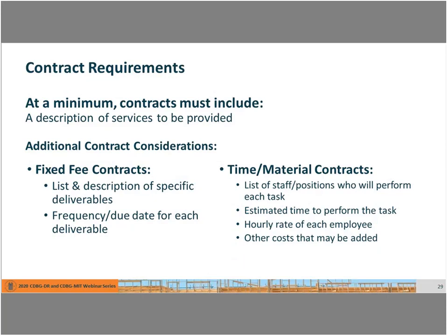For example, for rehab and intake services, consider unit pricing for contracts. This form gives grantee control over cost based on actual volume, allows for greater quality control, and provides that you are only paying for the documents that meet your quality requirements. A couple of examples would be a completed intake application with the documentation required that you need to make your eligibility determination, or a completed construction inspection and estimated cost to prepare that allow you to make a determination as to the cost of the scope of services to be constructed.